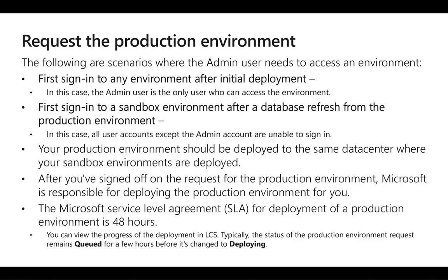We can clear the sign-off only while the status of the production environment request is queued. To clear the sign-off, click the queued button. The status of the request is returned to configure. We then can make any changes that are required and sign off again.